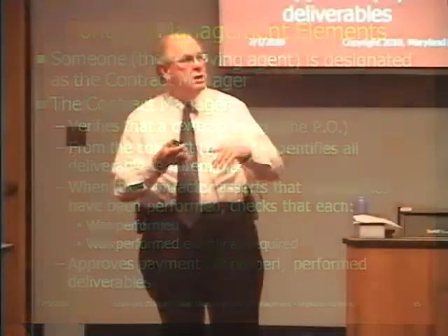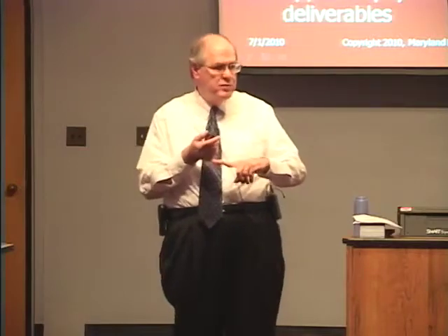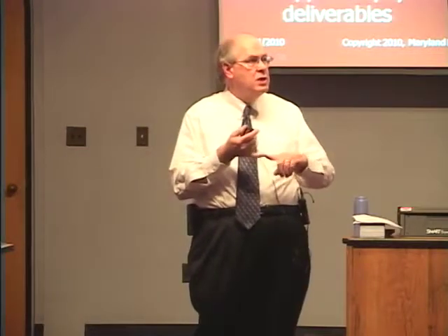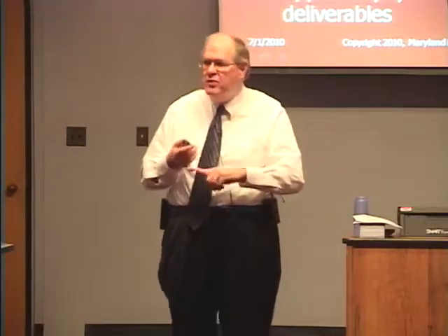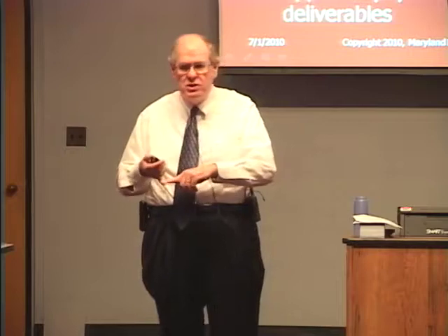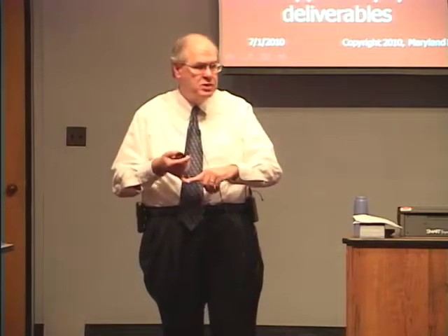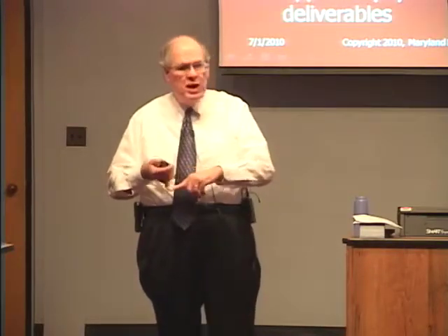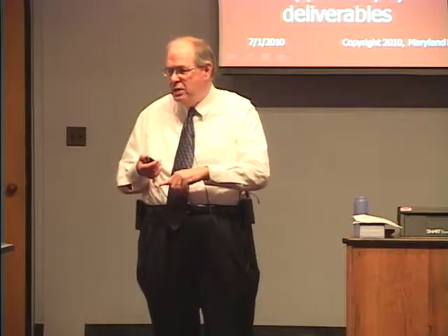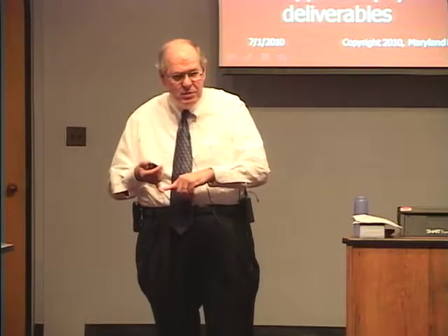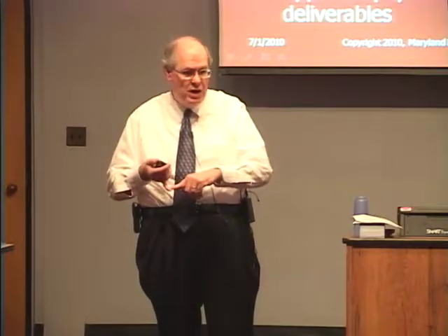And so, again, you have to look at what the deliverable was, and then you're going to have to determine whether it was properly provided. Just because the vendor says, I'm done, I have done the work I have contracted to do, doesn't mean they necessarily have. Someone has to look and has to verify that it has been completed as specified.